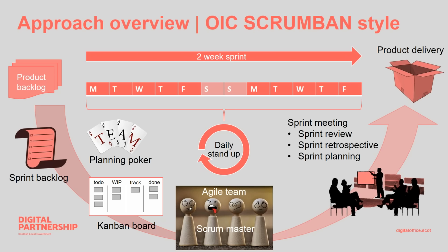And where we differ from Scrum, Scrum talks about, you set your sprint backlog, and that's what you do for the sprint. We find that a little inflexible. So what we do is, if new stuff comes in, well, we could park some of the things we were planning, and we'll bring those new items in. But with Kanban being a pull system, we try to make sure we finish one thing before we start another from the sprint backlog. So that's really an overview of what we do.